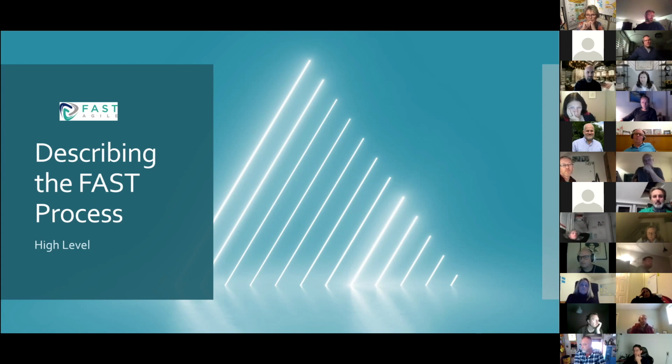After a period, whatever the iteration is, and I'm going to say 2 days. And at Primera, we did 2 days, we did 5 days, and we went back to 2 days. So I'm going to encourage you to try 2 days. After a 2-day iteration, we come back together, and the goal here is to sync up with the entire tribe and to say, hey, here's what you need to know about what my team did. So maybe the leader does it, maybe someone else, what we call the swarm leader does it, or maybe it was someone else in the team, doesn't matter, but you get up and you share.